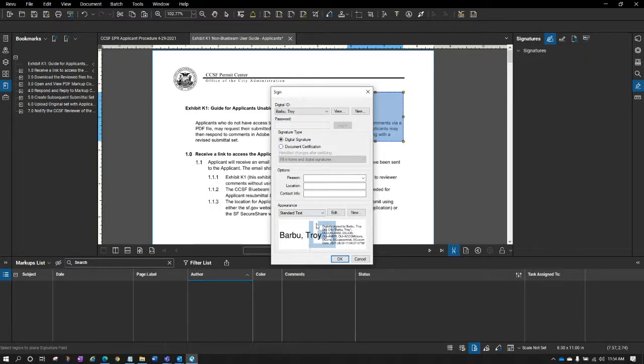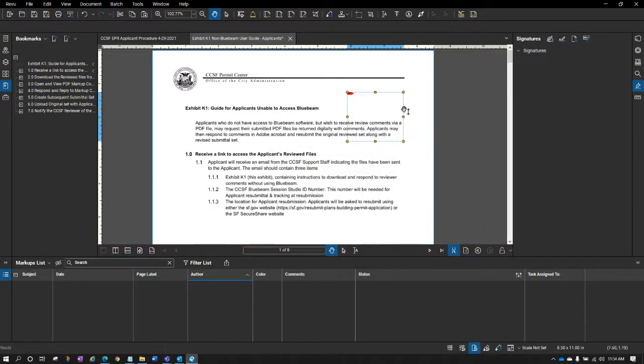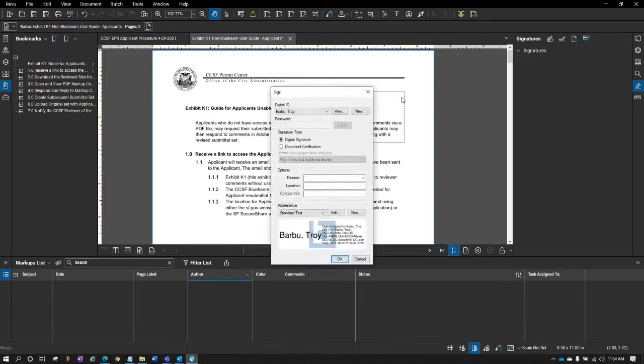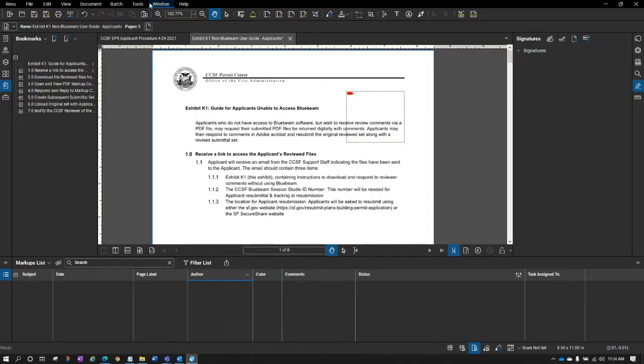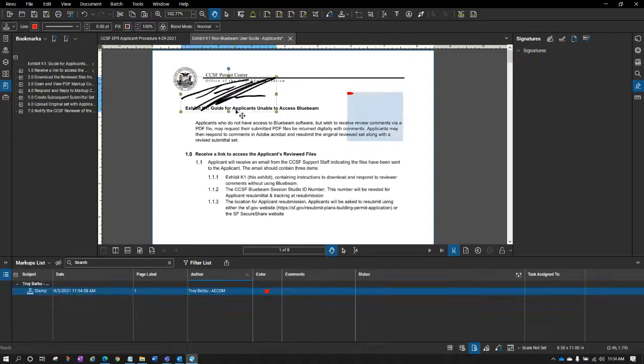It's a digitally signed document with a digital ID associated with you. That's the one we don't want you using, because when you apply the signature, it locks out the document. What we want you to use is a graphical signature. A graphical signature is just a scan of your signature, a JPEG or PNG file that represents your signature. Those are the ones we do want you to use.